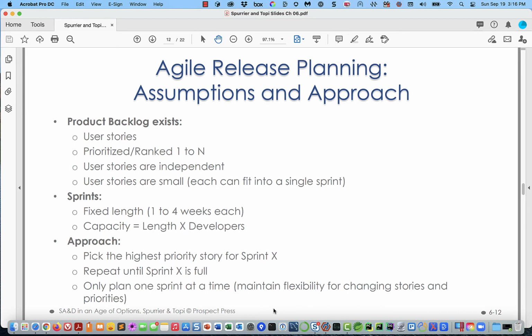So this release planning and product roadmap stuff, even though everybody says that Agile isn't big on upfront planning, these are meant to take the user stories and show about when we think they're going to get done. And that would help us to define some intermediate release products that would allow parts of our product to get into the field and start to create some value. So that's what this slide is all about.